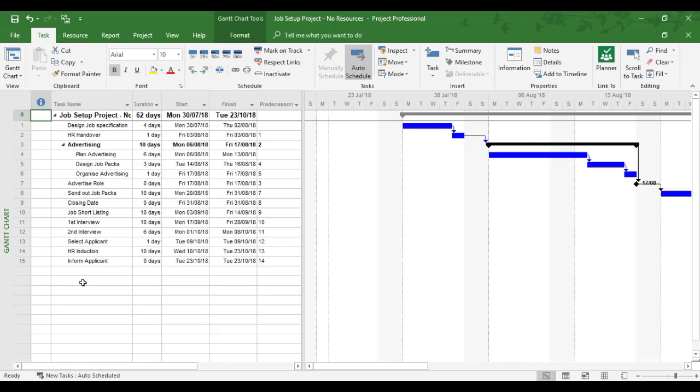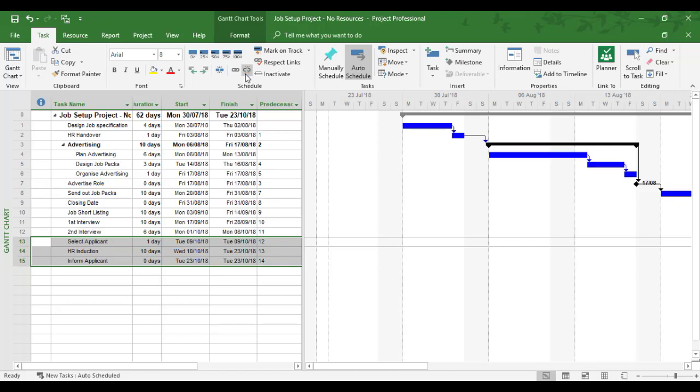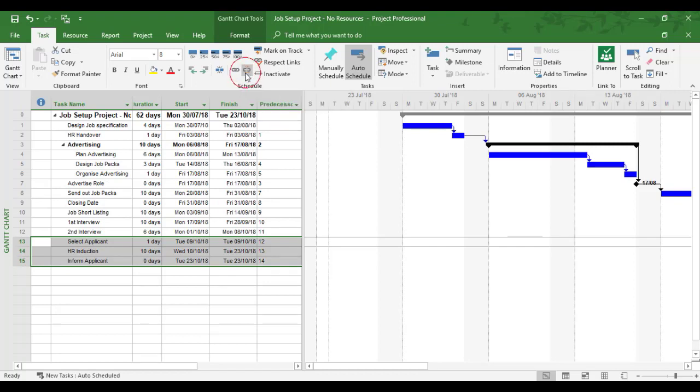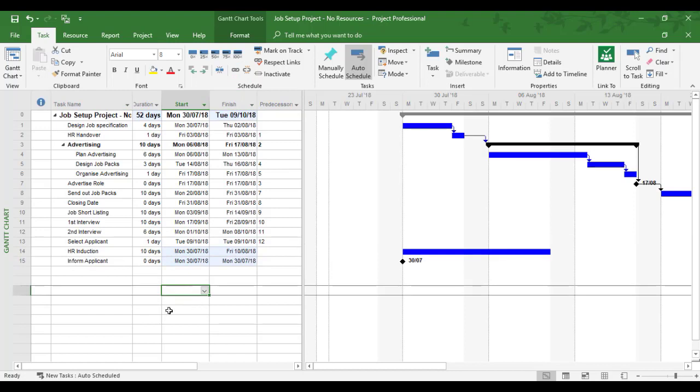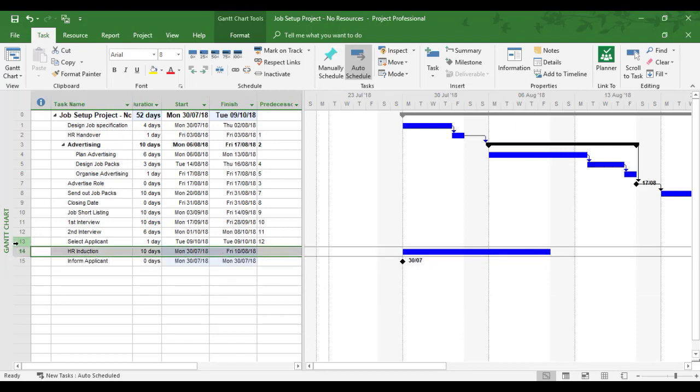Now, when I'm changing the order of tasks, I tend to work in what's called isolation. So I'm going to isolate task 13, 14, 15 from the rest of the project, and I'm going to break the link. So I'm going to separate these three and I've unlinked them. Now I'm going to move by dragging task 15 above task 14. So I've now got the inform applicant above HR induction.